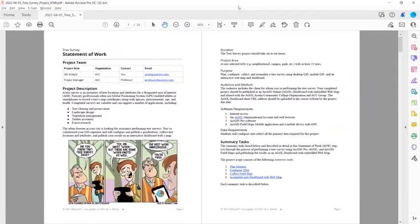If you look on page two, you can see the duration. This project should take six to ten hours, and your project area is a user-selected AOI, or area of interest.